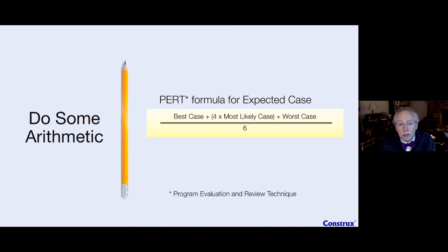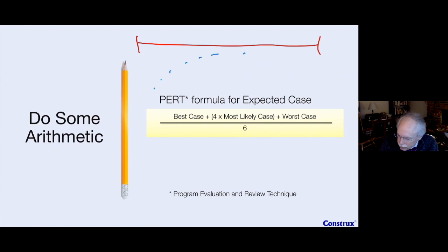Now, the trick is we won't be doing this arithmetic just once, right? I suggested a moment ago, if we look at a timeline of our project, right? Initially, and if you think of our cone friend out here, we're at the wide end of our cone. We come up with our first estimate point. And we come up with our best case. We come up with a huge multiplier for our promise case. We come back to our reasonable number, our planning case, do the math. We'll say, okay, we expect our planning number to be X.